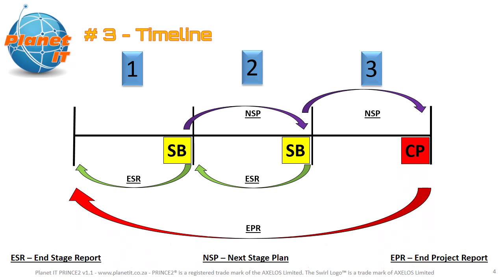Of course, as part of closing a project process, you don't do an in-stage report, however you do an in-project report, and there's no next stage plan that gets produced because you're in your final delivery stage. So there is no next stage to plan for. So be very careful. This will probably come up at some point. Where do you need to apply stage boundary process and where do you need to apply the closing a project process?